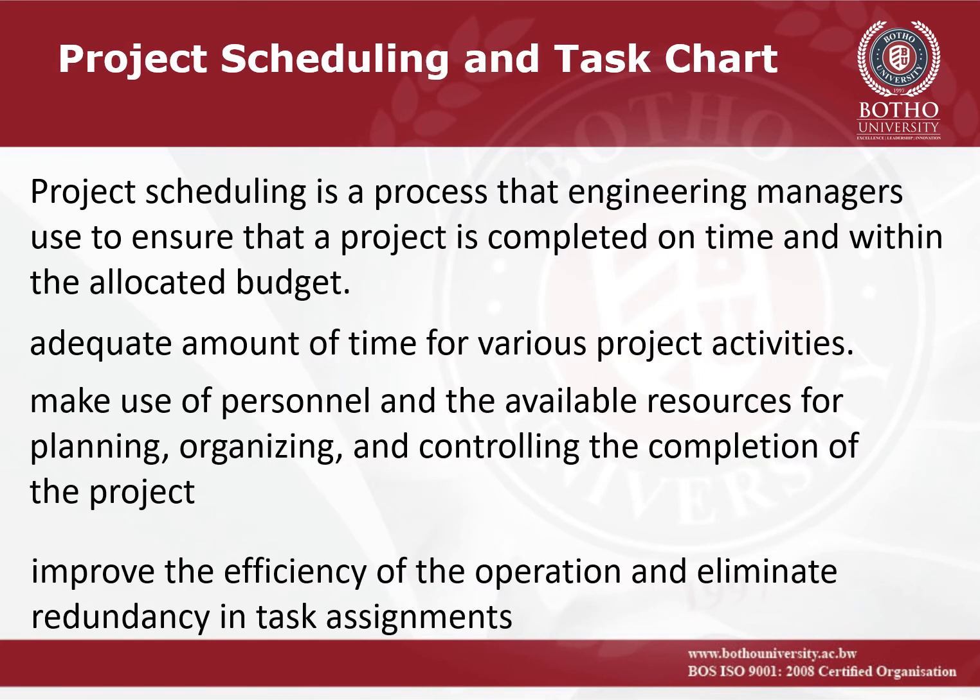Project scheduling involves creating a document, these days usually a digital document, that details the project timeline and the organizational resources required to complete each task. A schedule is a listing of a project's milestones, activities, and deliverables. Usually dependencies and resources are defined for each task, then start and finish dates are estimated from the resource allocation, budget, task duration, and scheduled events.